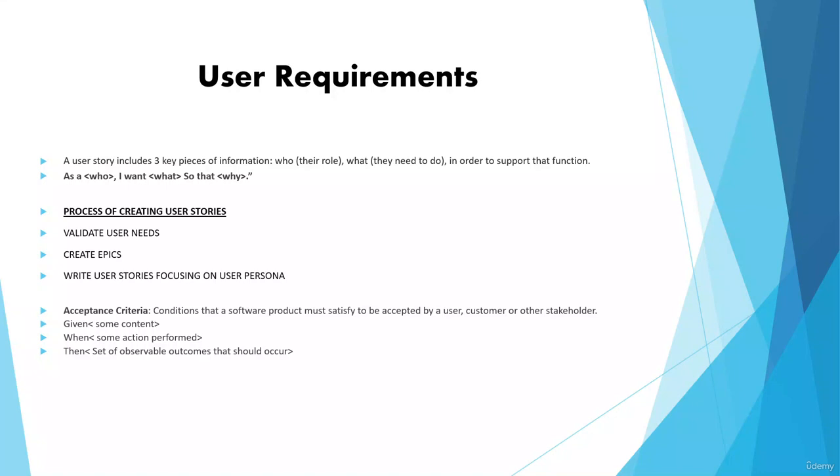The stakeholders and other team members can add user stories and requirements to the product backlog in the form of a to-do list. The product backlog is enough to start work, instead of the lengthy formal documentation used in the traditional project management approach, and consists of user stories, priorities, and the estimation of time to be completed. The product backlog is analyzed and reprioritized after every sprint, and based on that, stories are selected for development for the next sprint.